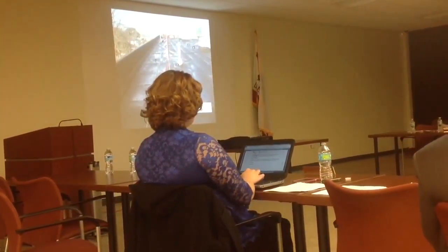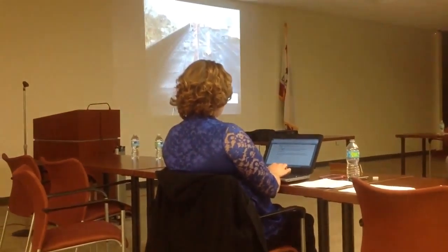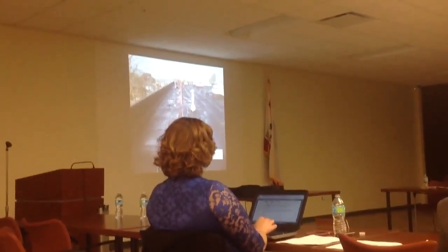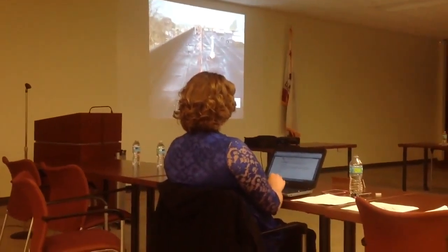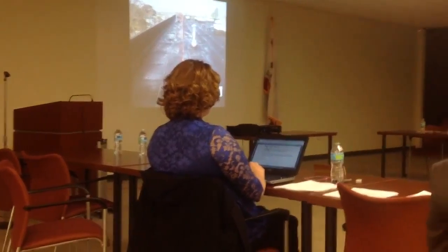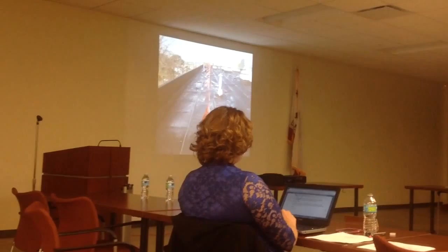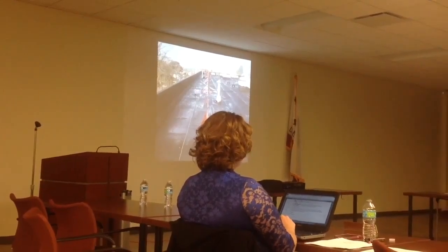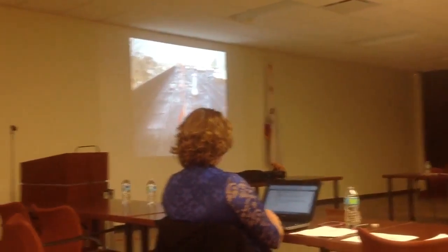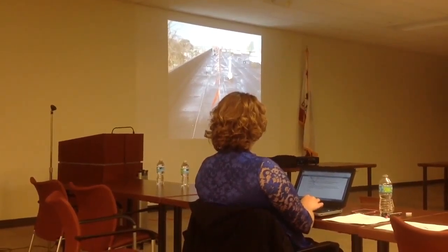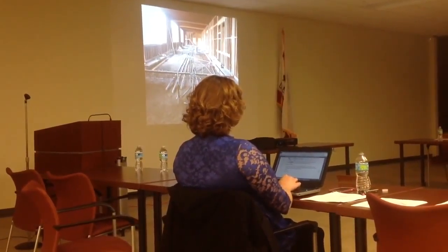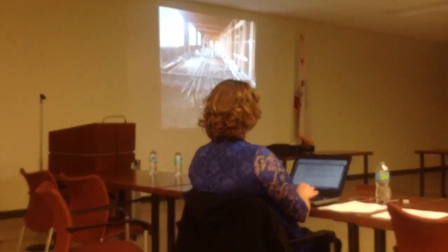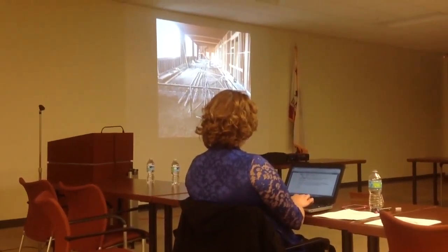I forgot to point out, you've asked that the photos be numbered so they match the 22 project items. For the projects that have multiple photos, we've noted them as 2A, 2B, or 2C, so that you can follow along with particular projects. This is an eastern project. We're currently well past this point. This is the cap sheets that went on for the roofing, but we are watertight over there now. The roofing final cap sheet is going on. On the interior of the buildings, on the north and south buildings, we have finished the reinforcement of the foundations. We've backfilled. What you see is the underground conduit going in within the classrooms.